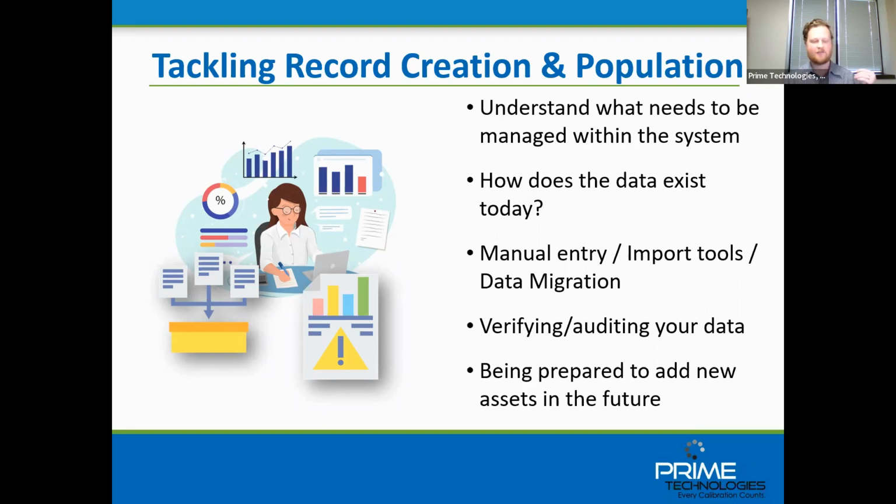This is if you have the system in an old database and you're switching over to a newer calibration management solution. Are you going to want to just start over, or do you want to take all that information and all that historical data, all the audit records and audit trail and everything from your previous system, and pull all of that in? The way this could really look is that you turn the one system off, you turn on ProCal, and then everything's immediately there. It's just like the interface changed, but the data is all the same. So those options are all available.